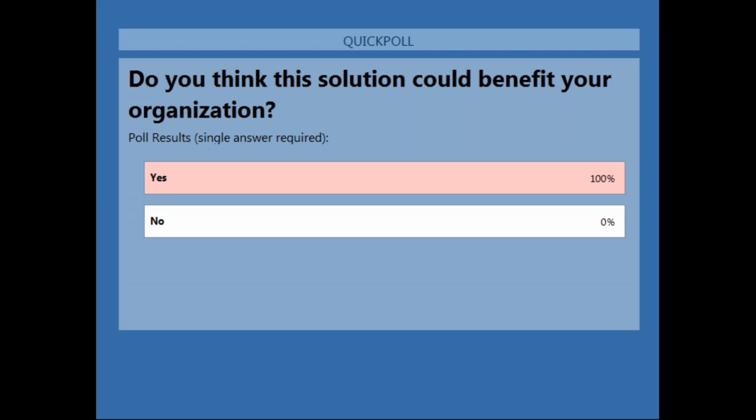Great. And the next question pertains to implementation, looking for an average timeline for what it looks like to implement. That's really hard to tell. As we talked about those levers earlier, it depends on your volume, the methods that those are coming in, the quality of your data as it stands today in PeopleSoft, and whether or not you want to rework your workflow. There are organizations that say, we have everything, our workflow is designed, it's in PeopleSoft, and we're really happy with it, and we don't want to change anything. That would be a shorter implementation versus an organization that said, we need to redevelop all of our workflows, we need to make sure they're all compliant.